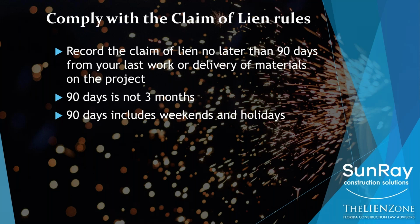So if my last day on the job is today, I'm going to start counting, and tomorrow is day one. I'm going to count 90 days, and if the 90th day lands on a weekend or legal holiday, when the clerk is closed, then I'm going to roll it to the next business day when my deadline arrives. So it's possible that you could, in certain circumstances, have 93 days to record the lien.